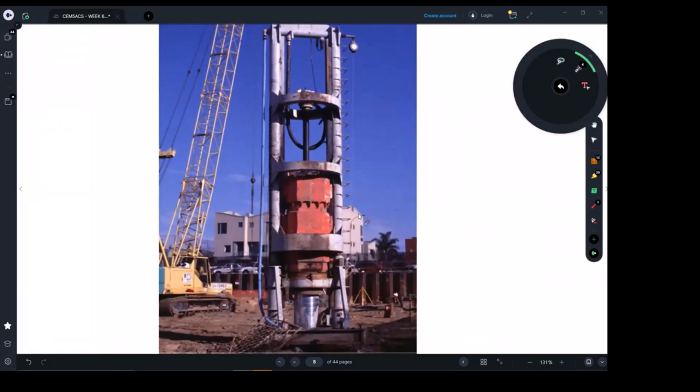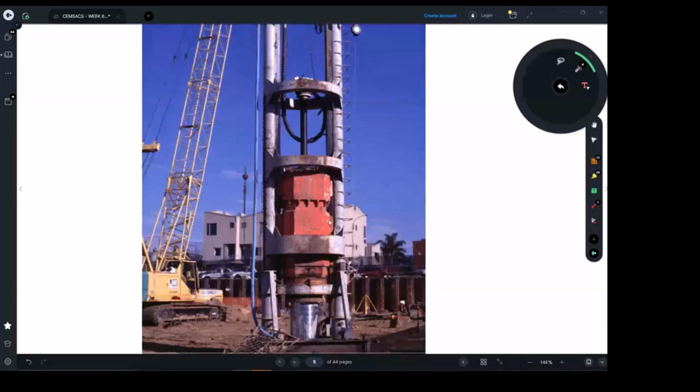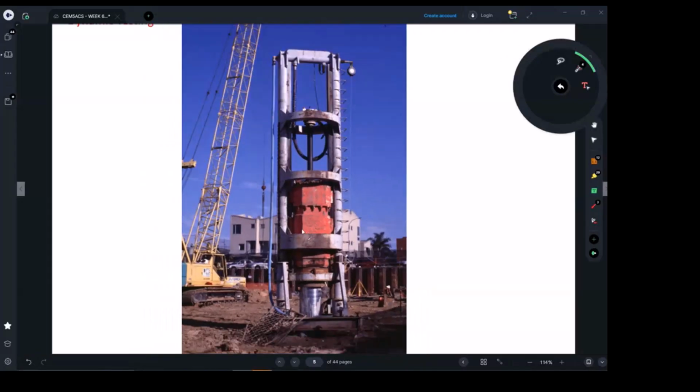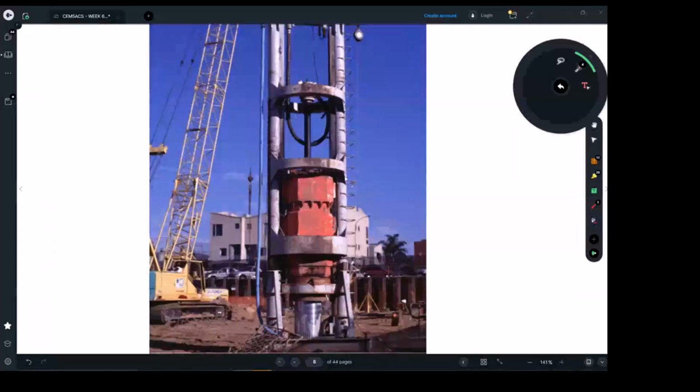Dynamic testing, as I said to you, for those 15% or whatever agreed, they may come back and start to apply some vibrations into the ground. And the vibration, there are techniques. You don't need to go through them. We do have different subjects where we tell the students how this is done with the equations and all the processes. Basically, you will have equipment like this, which will apply dynamic load onto your pile.